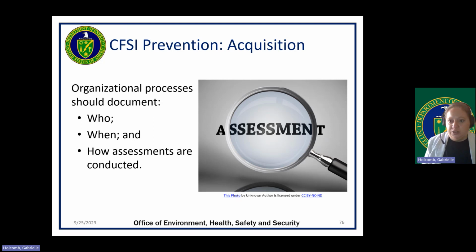Assessments may also include trending or analyzing supplier past performance data. This could be reviewing information such as nonconformances, counterfeit, fraudulent, or suspect item complaints, on time delivery, etc., which could all point to concerns with using a supplier or potential supplier risks.